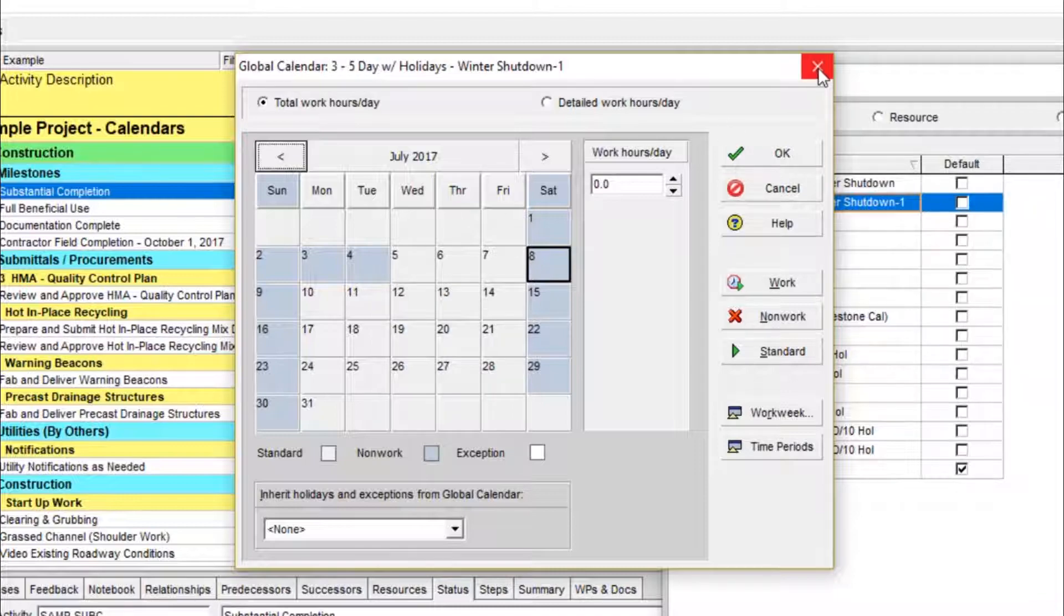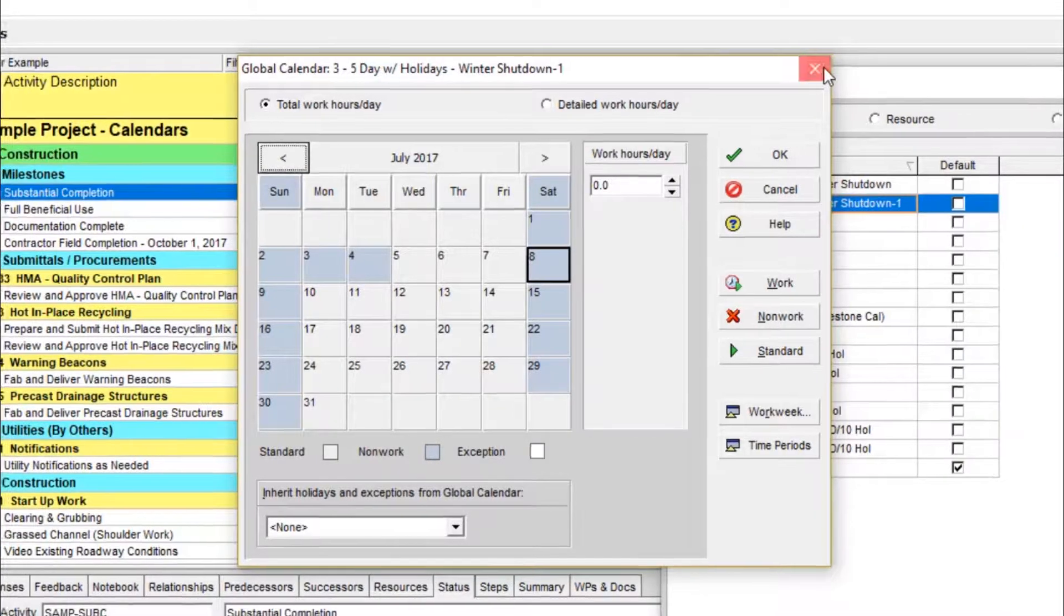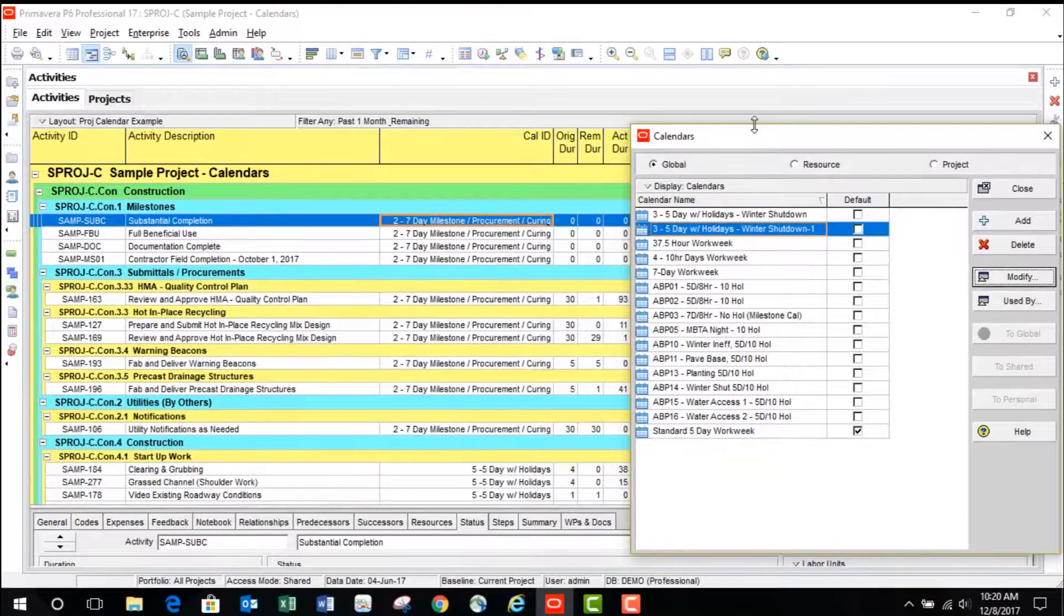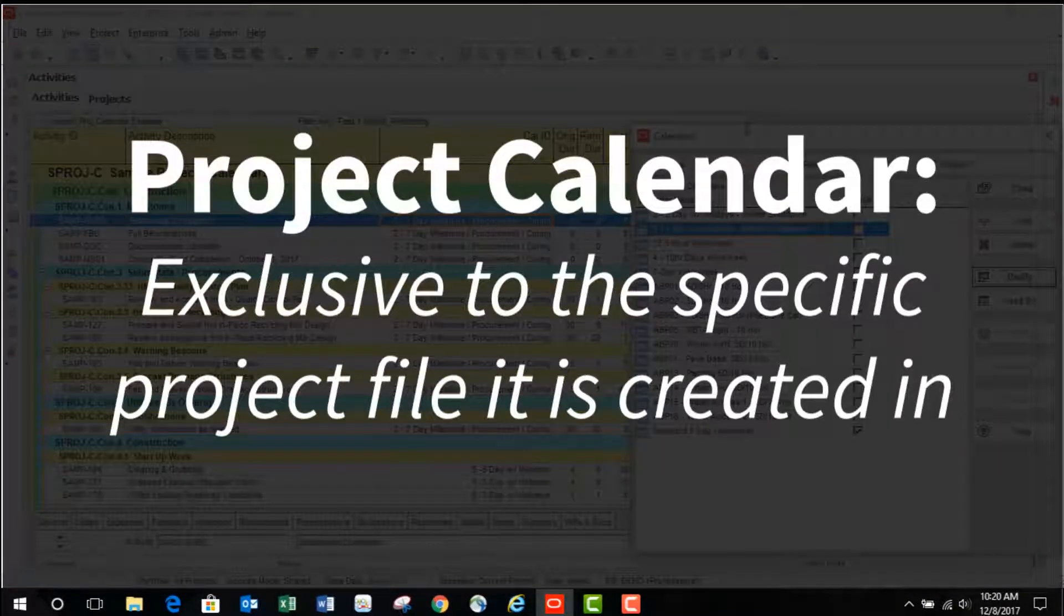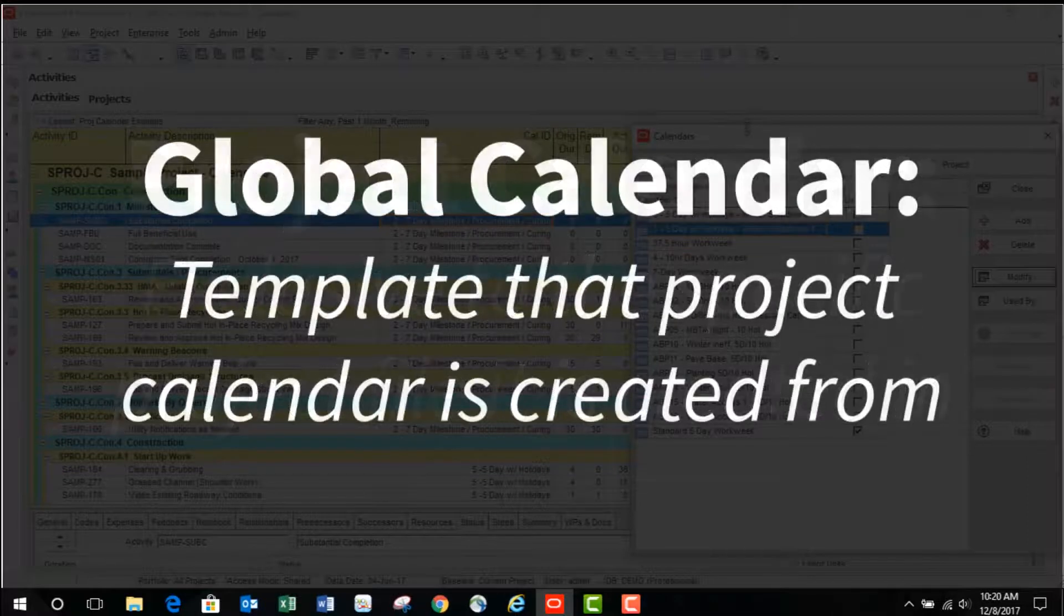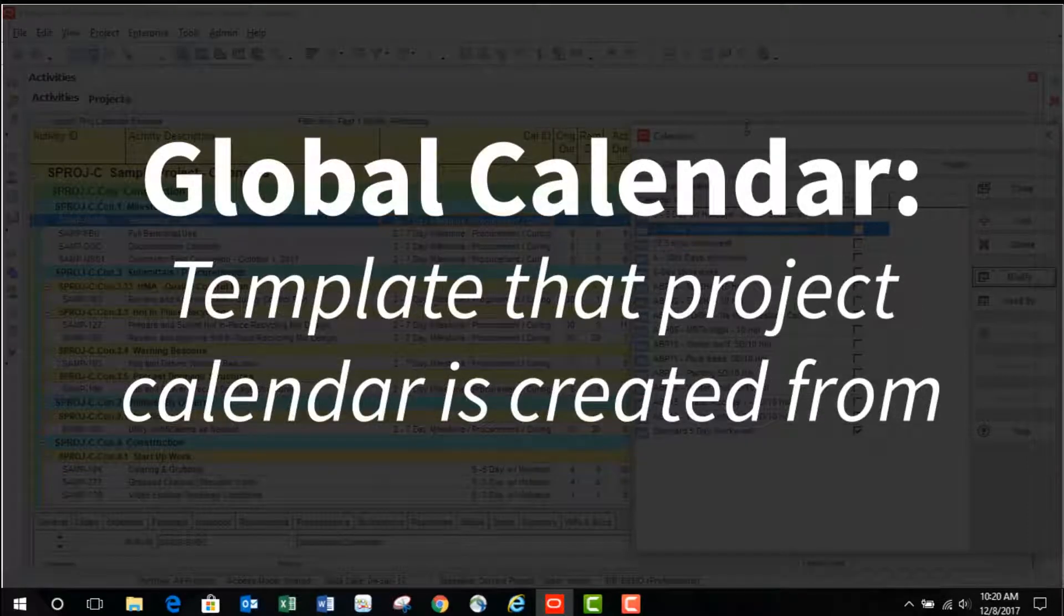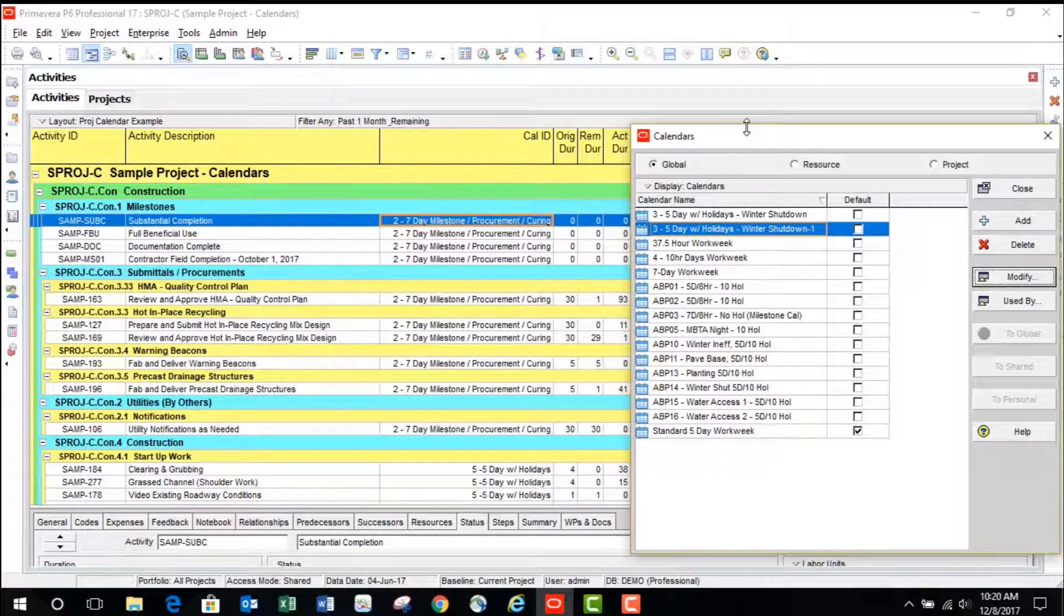A good way to avoid these issues is to exclusively make use of project level calendars rather than global calendars. A project calendar is exclusive to the specific project file it is created in. Global calendars can still be maintained as these will be the templates that your project calendars are created from.